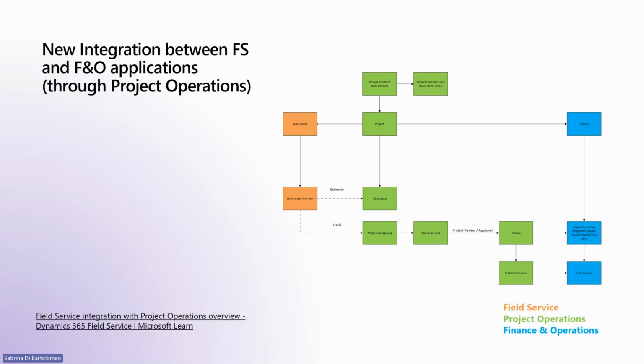They are turned into project journal lines for cost and revenue, which are checked and approved to make sure the financial data is correct. After approval, the journal lines become project actuals, which are the official financial records for the project and contract line. These actuals are then used to create draft pro forma invoices. The drafts are reviewed and adjusted if needed, and then confirmed for final invoicing.